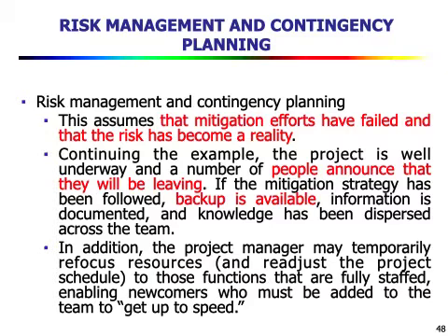If the mitigation strategy has been followed, backup is available, information is documented, and knowledge has been dispersed across the team. In addition, the project manager may temporarily refocus resources to those functions that are fully staffed, enabling the newcomers who must be added to the team to get up to speed.